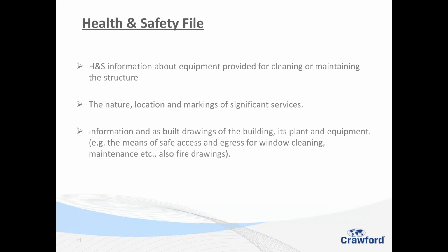We have a chase system, so as soon as the contractors have finished, we give them a fortnight to get their paperwork together, and then we ask them for all of it so we can send it to the policy holder in a timely fashion, collated, and in a way that they can actually store it safely.